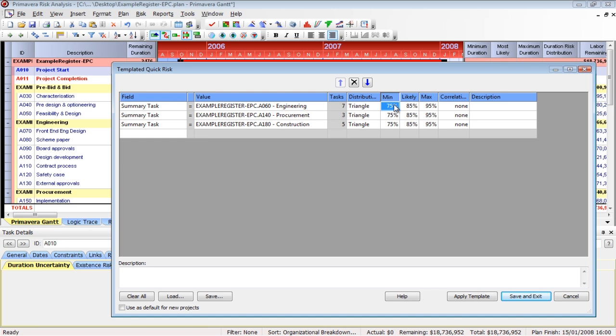the concept. Engineering. I talked to the engineering team. They said engineering was scheduled fairly aggressively. It's common on our projects that we have slip outs on engineering of up to 20% the way we schedule things. We could hit those dates. We do think they're maybe slightly aggressive. Maybe we'll put an extra 5% on the likely. The minimum, maybe it was scheduled at the minimum. And the maximum, yeah, it could push out 20%. So that 100 days could push out into 120.